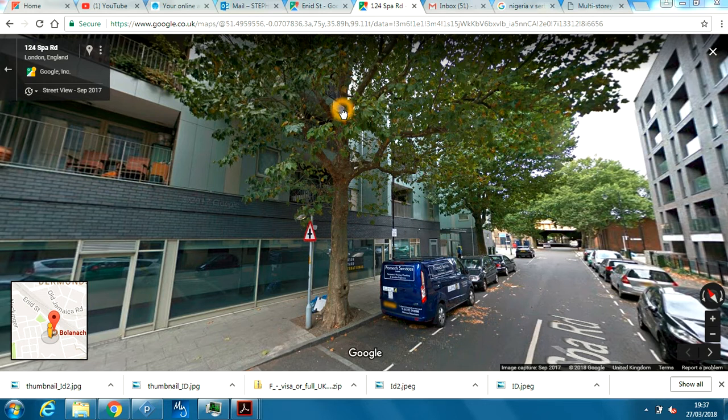So elevation F, in order to access it, would have needed access up and over. So scaffold up and over to access those elevations. You see? After discussions with the client, explaining the difficulty with having to do that, the costs associated as well as the risks, they eventually agreed to allow us to scaffold up and over.